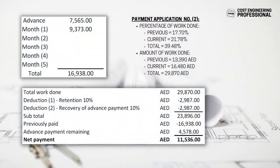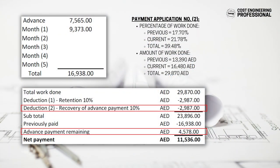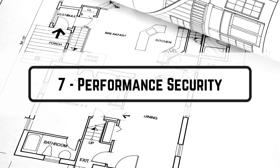Term number six is recovery of advance payment. If there is an advance payment in the contract, how is it going to be recovered? Usually the same percentage of the advance payment is deducted from the total work done in each payment certificate. A detailed example with numbers is covered in the video on the channel called 'How to Prepare Payment Application for a Complete Project.'